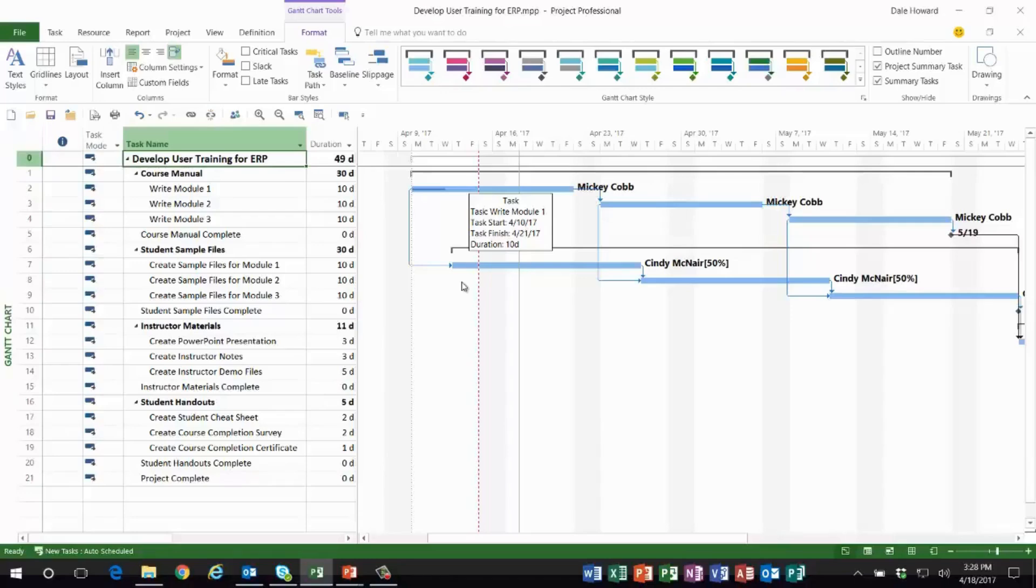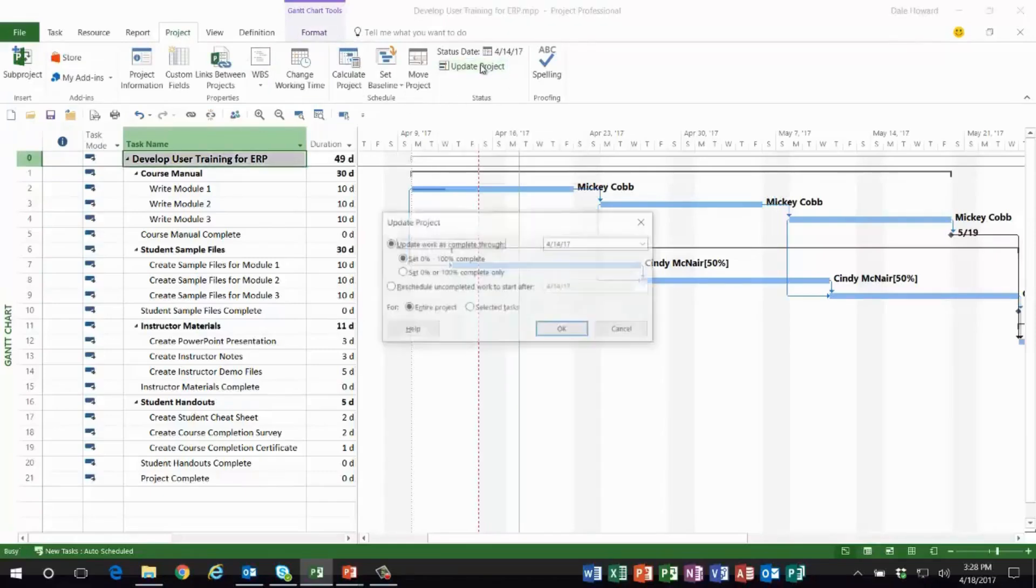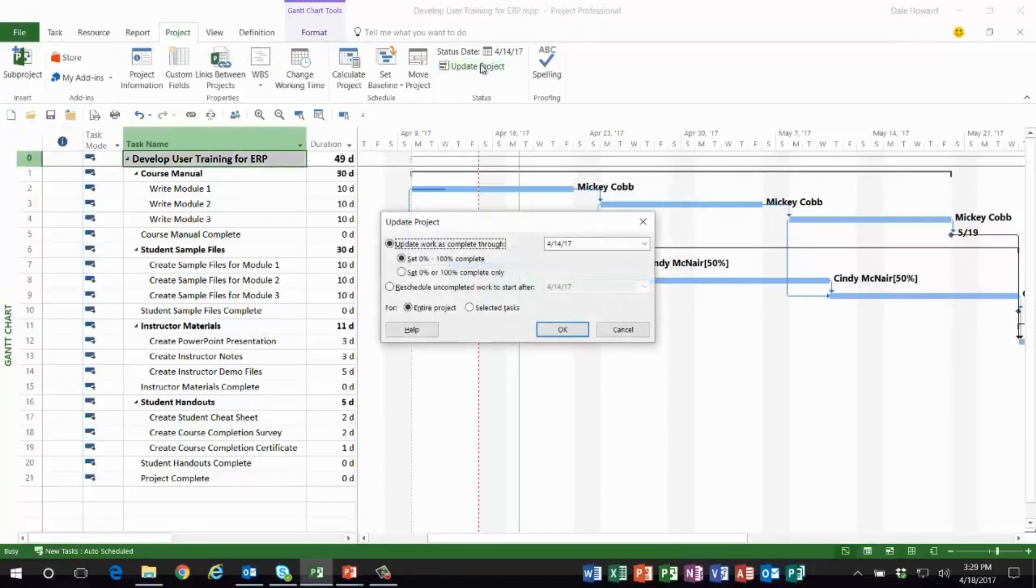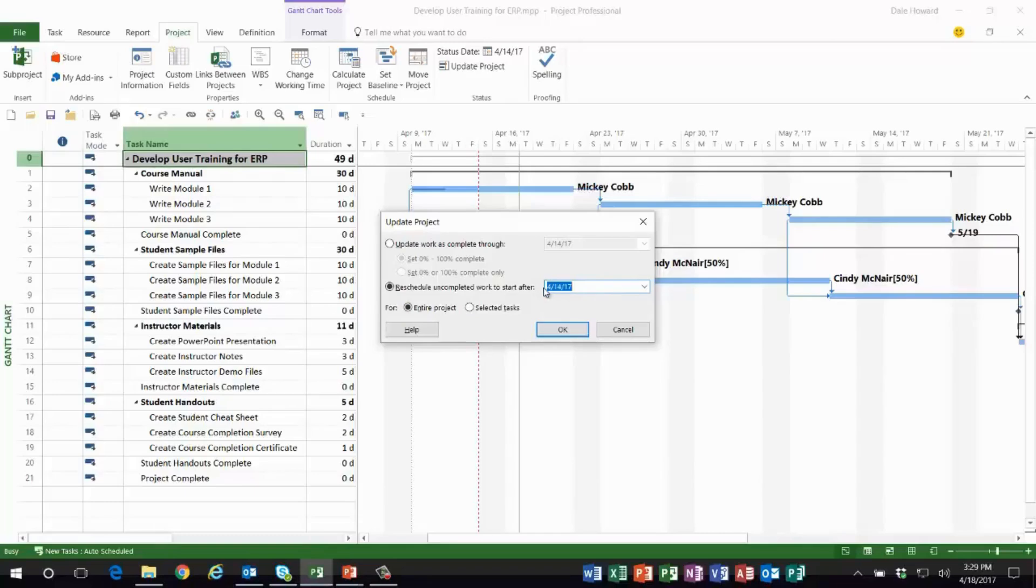is wrong as well. So here's how to reschedule uncompleted work from the past into the current reporting period: we go to the Project ribbon, over toward the right end, and click the Update Project button. In the Update Project dialog, we'll select Reschedule Uncompleted Work to Start After, we'll select the Entire Project option. Notice that Microsoft Project fills